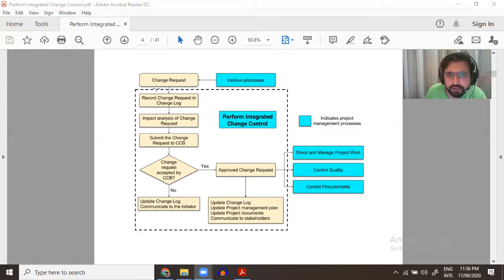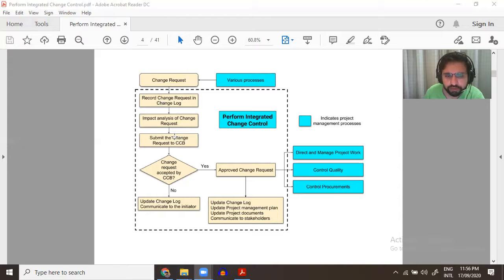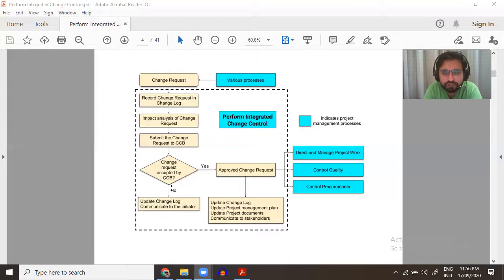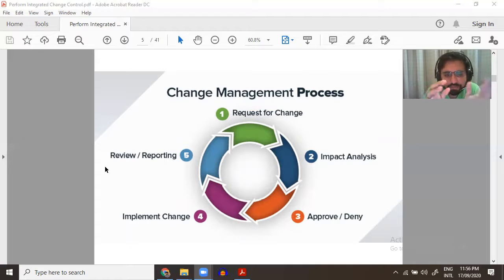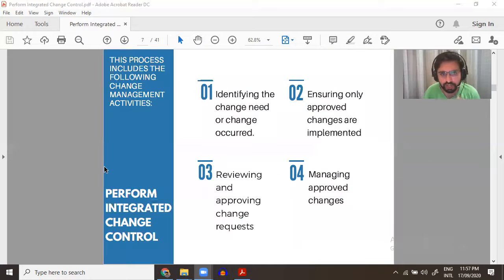Change requests are initiated through various monitoring and control processes and Direct and Manage Work. The request is recorded, its impact is calculated, and if the impact is reasonable, it goes to the Change Control Board. If accepted, we have an approved change request that goes to Direct and Manage Work, quality control, and control procurement, with updated documents. If not approved, we just have updated documents. In short, only approved changes are implemented.